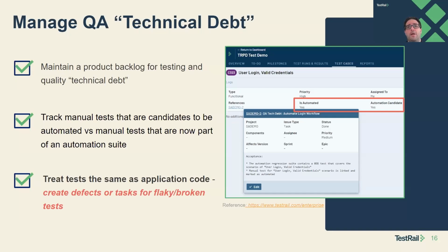We have a flaky test, it's unreliable, and we can't accurately ensure quality on a feature. We create a defect for that. That now is prioritized, and we'll get into defect triage. We'll transition to that in a minute, on how we then prioritize. So it adds visibility, and the product team has something to look at for impact and priority. So if your team's having problems with doing this, maybe think about, and again, this comes back to our working agreement, how do we treat broken tests and technical debt? This all aligns. But these are some techniques that I've used and had great success with.